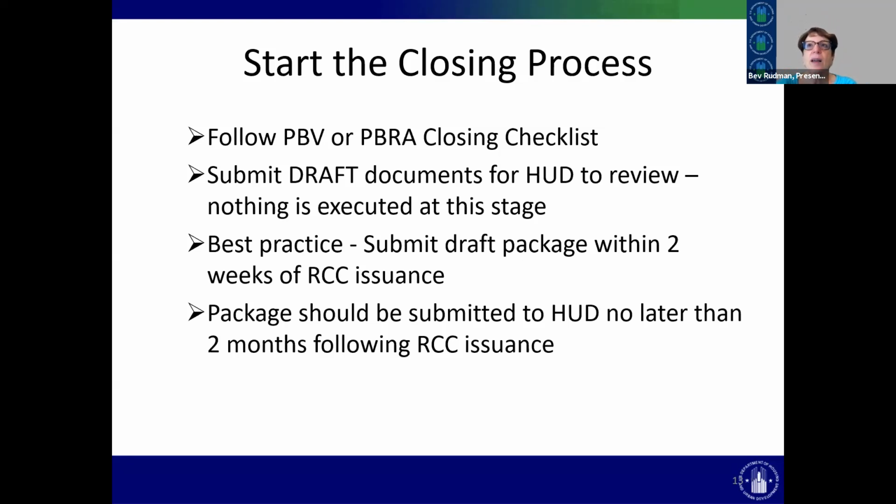And I've had times when people were like, well, I'll send you the package and then we'll be ready to close the week later. Well, that's a misunderstanding about how this works, because what happens is you send the package and then HUD reviews the package.